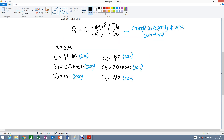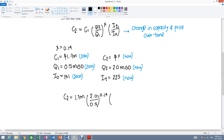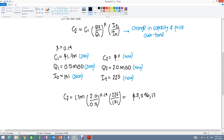We plug the values into the formula and solve for C2. C2 equals 1.7 million times (2.0 over 0.5) to the power of 0.14, times (225 over 131). Remember, the exponent 0.14 applies only to the capacity ratio. Solving this gives C2 equal to $3,546,178.